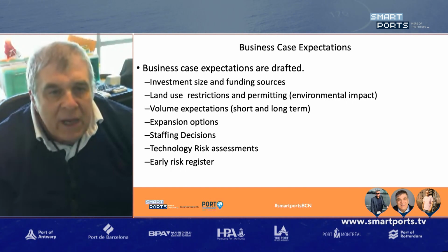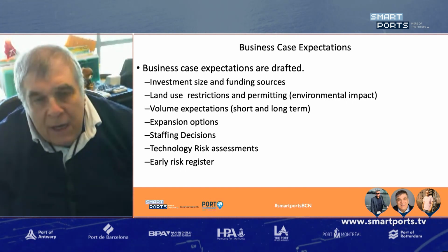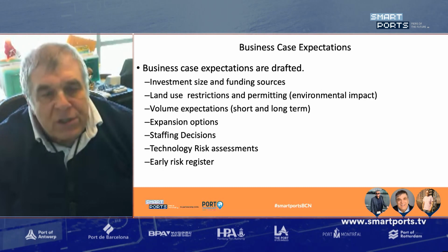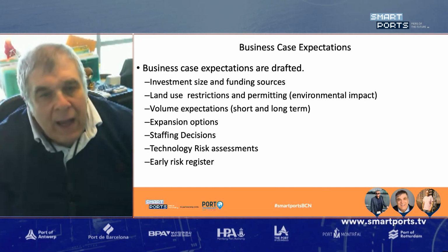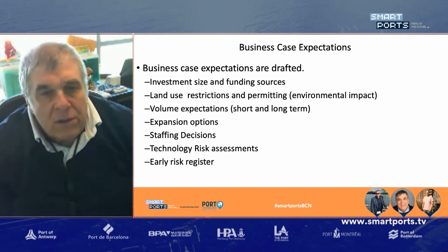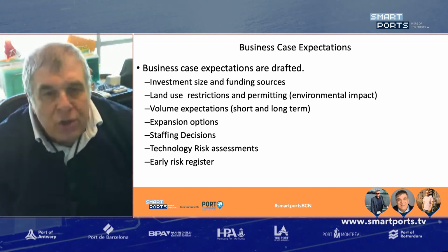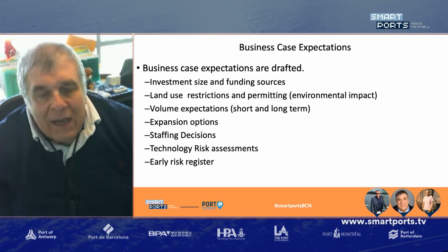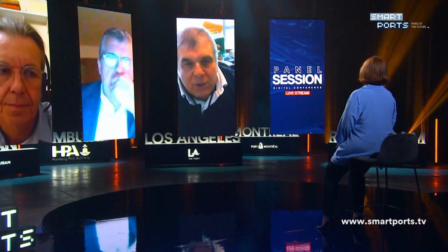So during the business case, we want to determine how much money do we need? What are the funding sources? What are their expectations for payback? Are there any land use restrictions, environmental issues or concerns? Volume expectations, both short and long term. Expansion options. If the investment goes well, what are my chances to expand the investment and make sure that it will be something that can grow? You're never going to have too much of a good thing. Staffing decisions. How many people will I have to employ?